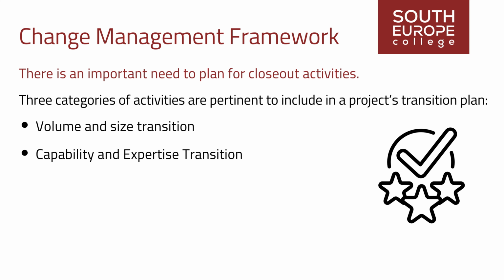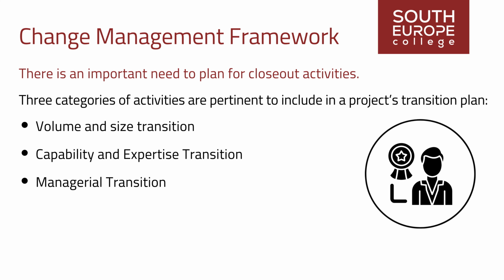Capability and expertise transition: shifting from an expert-driven set of capabilities to broad capability across all processes, including management processes, essential for the change. Managerial transition: progressing from a project-managed and sponsor-driven environment to an operations-managed and operations-driven environment.